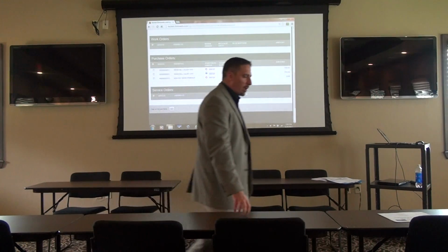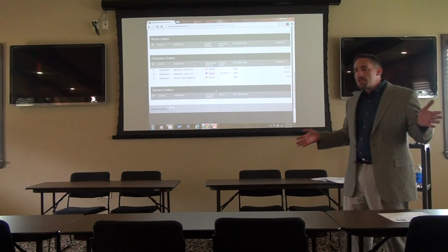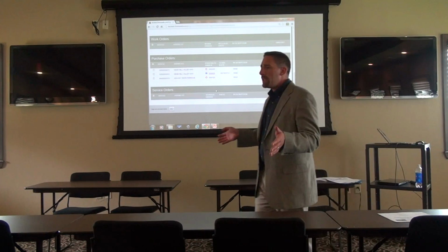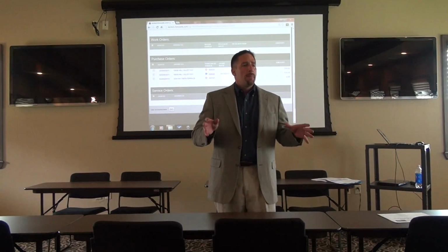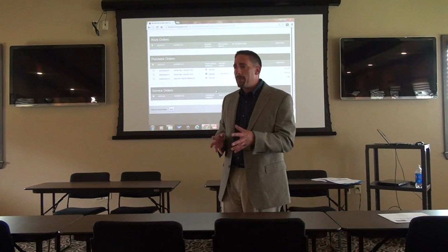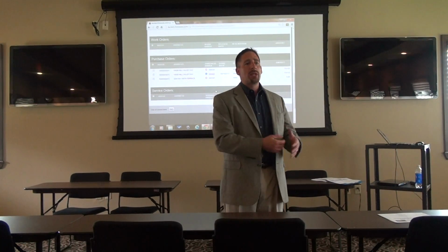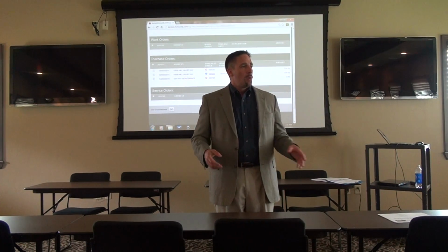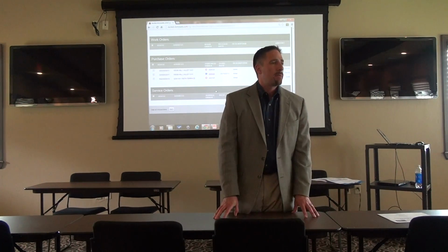The way that it's going to work, and I'll show you this more when I show you the job start, is these options that you're bidding on each have what's called a cutoff stage. All of you have your order that has to happen at a certain time during the construction process. So you're all going to fit into what's called a stage of construction. When the house starts, we're not going to create all the work orders and purchase orders and just give them to everybody.